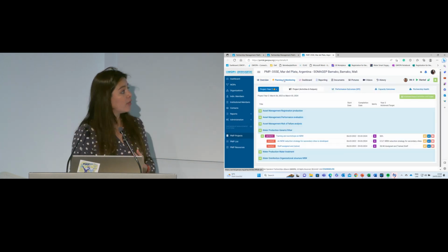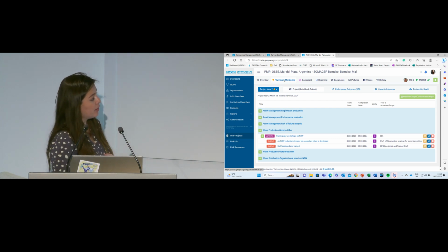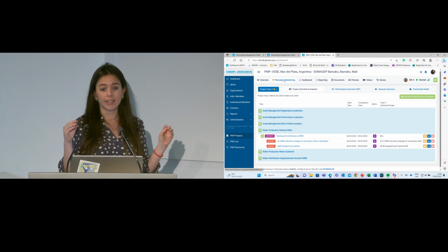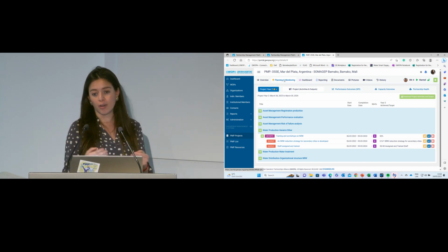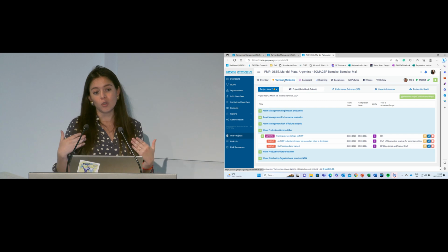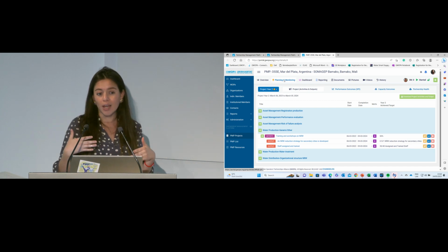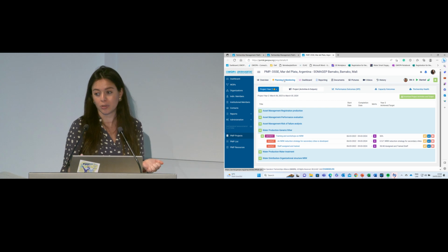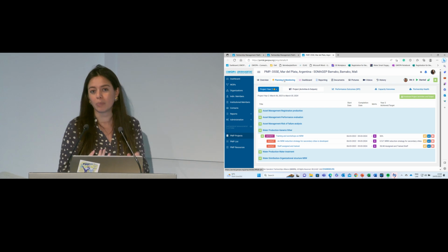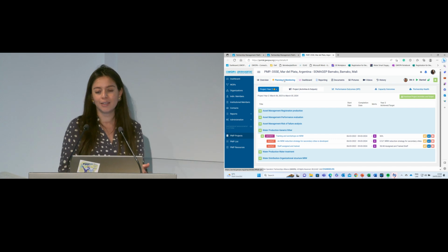Then you have the planning and the monitoring, which was the part that we were talking about. So how is this structured? We have the working areas that you previously selected. If you have 10 working areas, then by working area, you will be inputting the activities, and by activity, the outputs. So this is the structure that we have. And it depends, of course, on the program. It depends on the project. It depends on several things, of who's involved in the WOP, how detailed you're going to be in the moment of inputting the information. Okay?